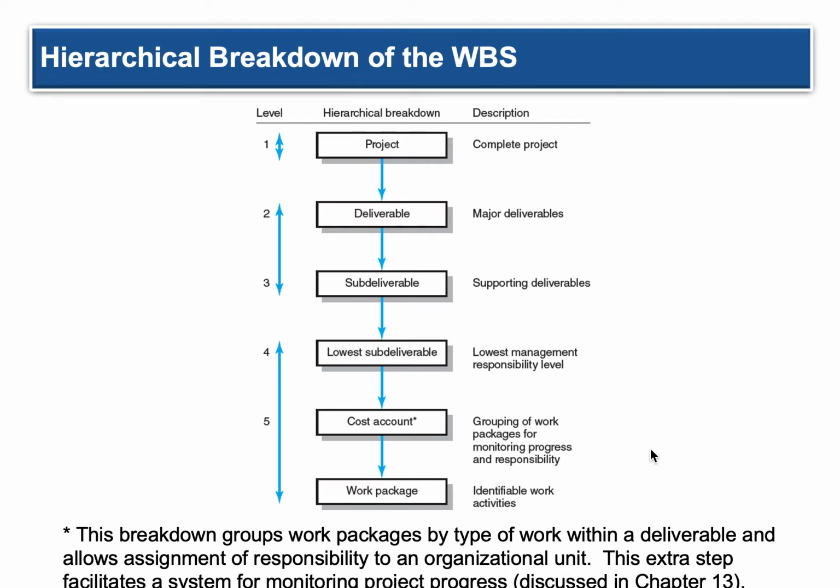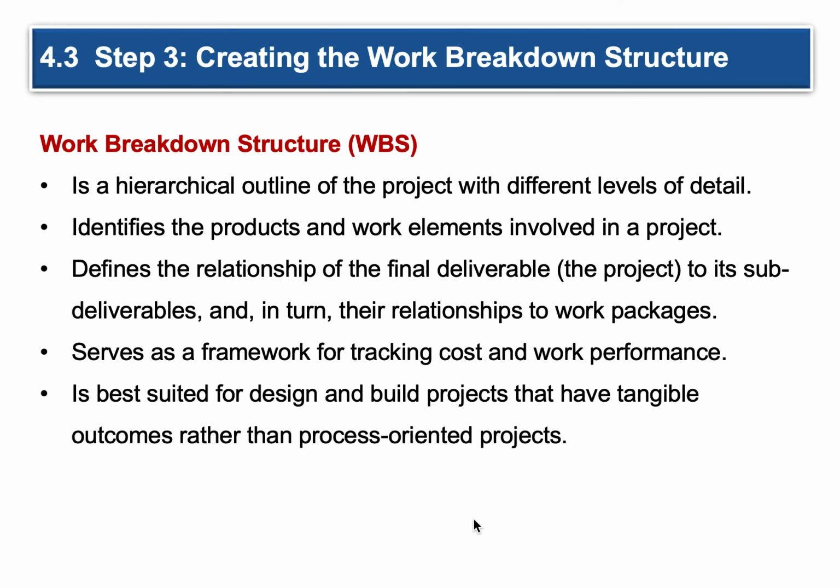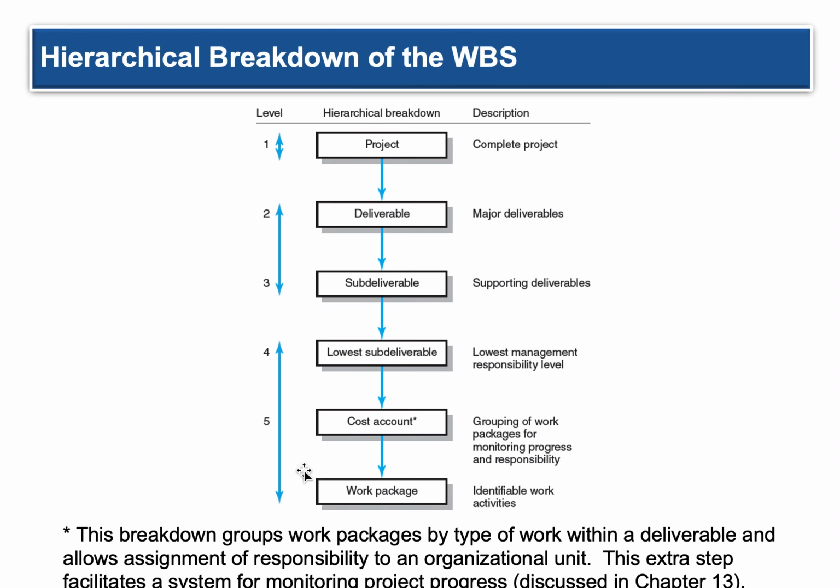The cost account: the biggest challenge in a project is putting cost to it. But once you get your head out of the clouds and you have this one business project you want to do for a corporation, once you start breaking these things down, it gets a lot easier to assign costs when you put things in very simple terms. And I'll show you what I'm talking about here in a second, I promise. And then you can break down the work down here that says, hey, here are the things that we need to do. Okay? This breakdown groups work packages by the type of work within a deliverable and allows assignment of responsibility to an organizational unit.